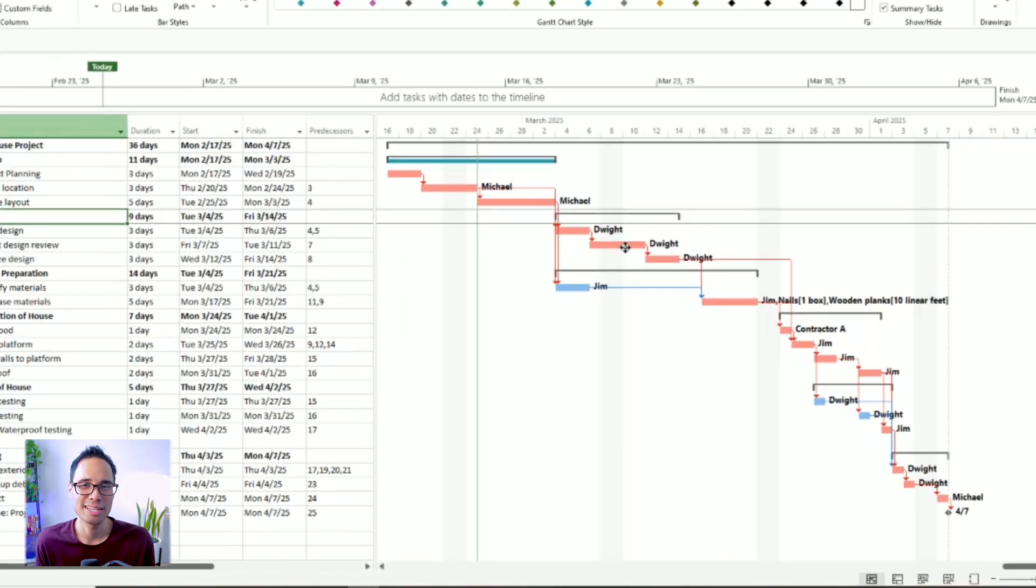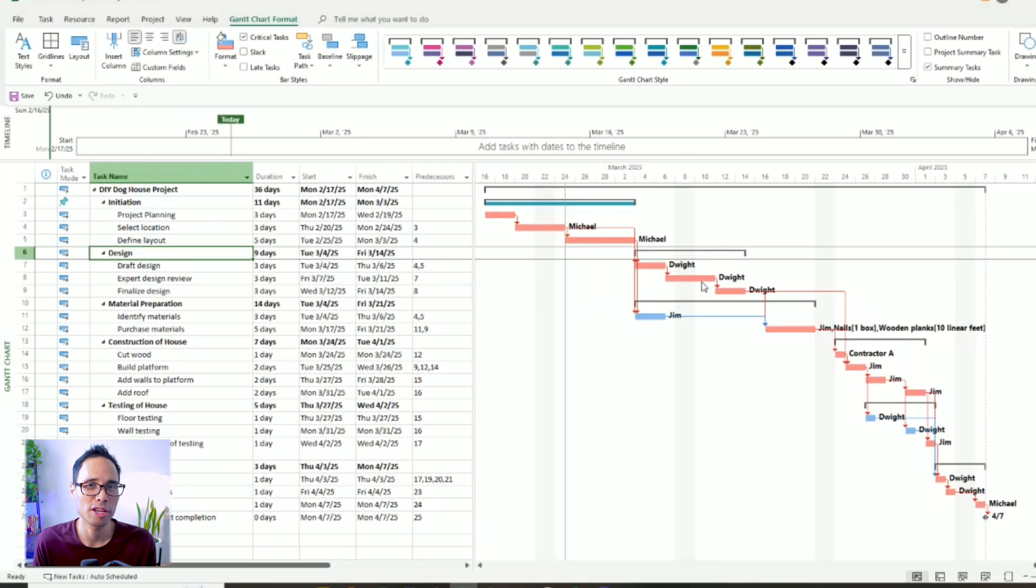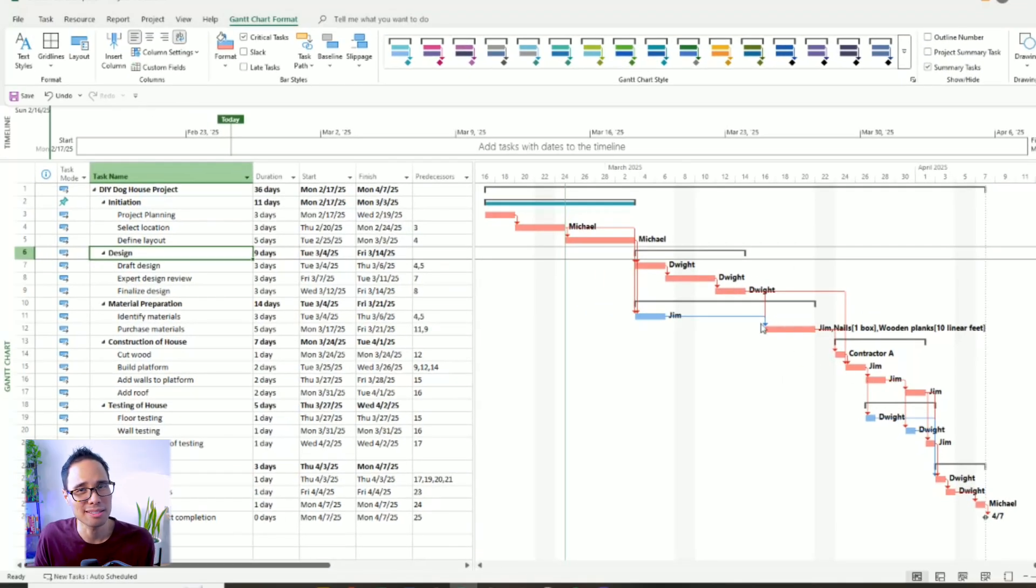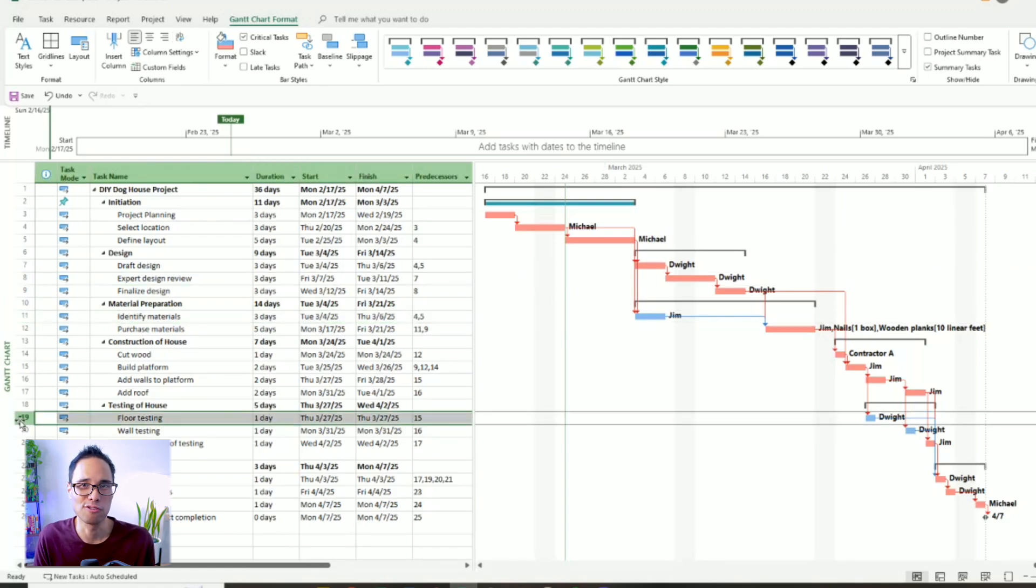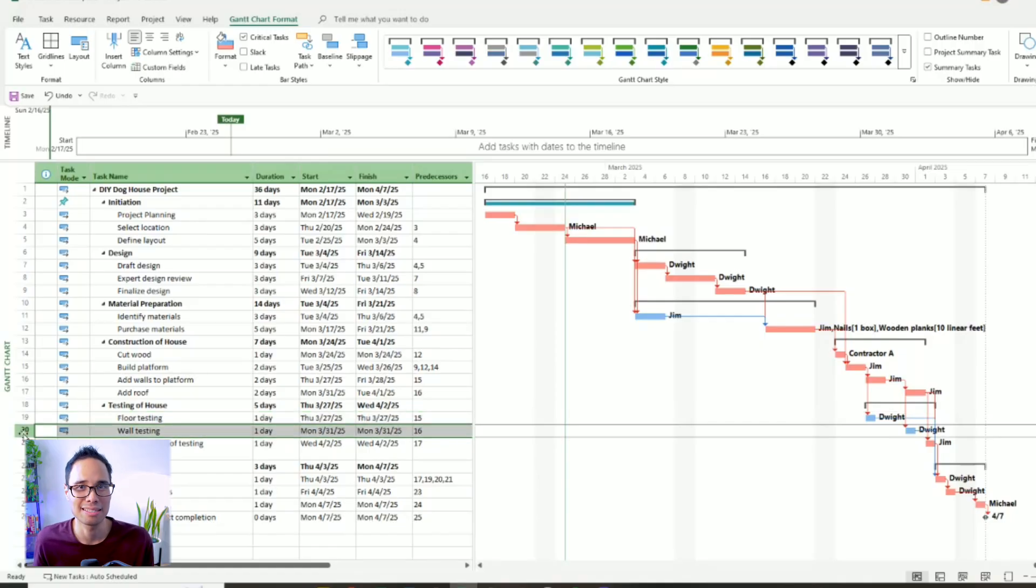For our project, we see that the majority of our tasks are on the critical path. It looks like the task for Identify Materials is not on the critical path. And same thing for floor testing and wall testing. You'll see in our Gantt chart that our critical path starts from the very beginning of our project and ends at the very last task. That's because our critical path is the longest path in the project.